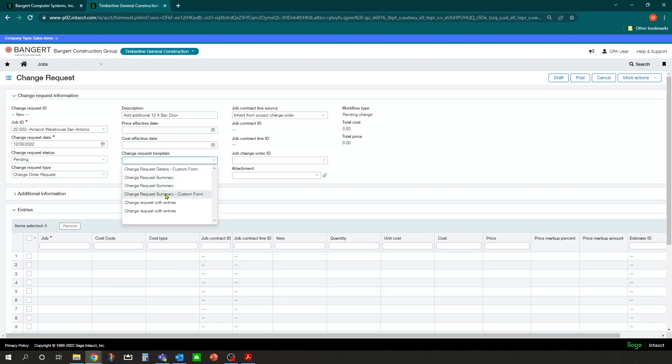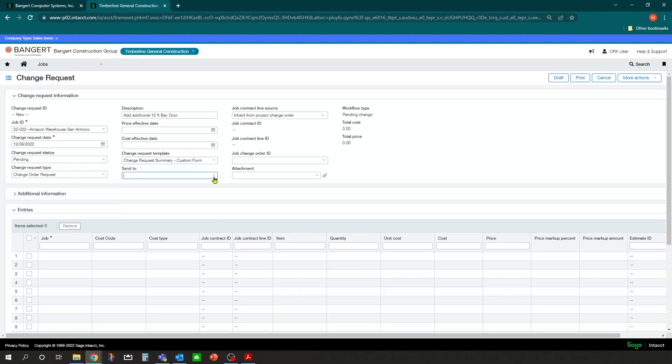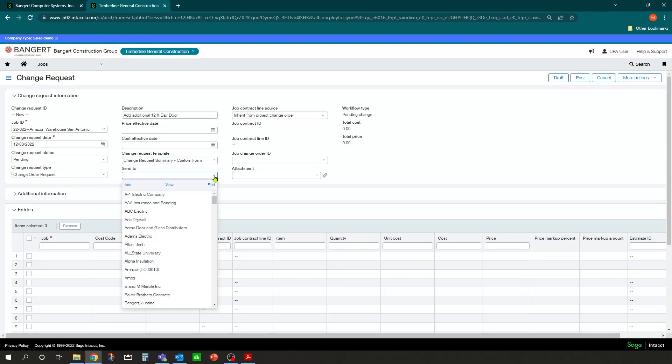And we'll be using the change request form, the custom form template right here. And we can also code who we're going to send this change request out for approval to. And in this case, we'll send it out to the Amazon customer.